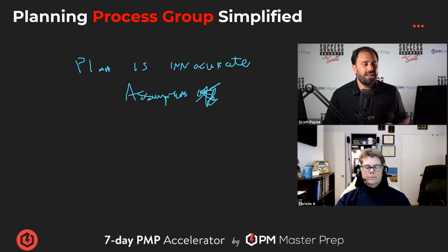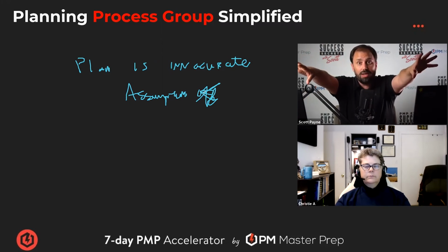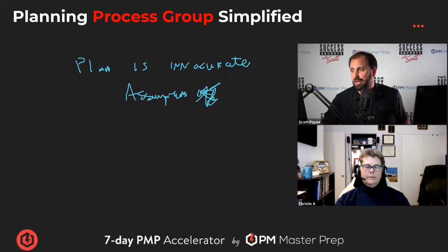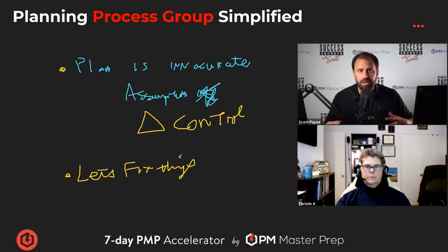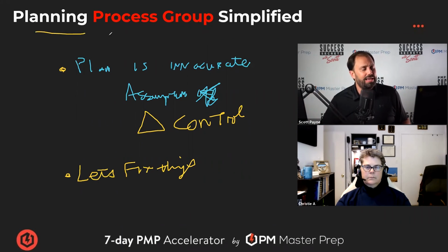Let's adjust. Then our plan can get changed, so we set realistic expectations with the people that matter. And if we want to change the plan, by what means is the only way to do it if it's big? Your change control process, integrated change control. So it might be that it's inaccurate; that's one variant. Or it's, let's fix this thing, we're off. What can we do? We go in and look at it. Where are the problems? Where's the root cause? We rally the troops and get there. Might need a change request, might not. But how do we fix it? How do we get back to it? Because I see planning and EVM as cousins.